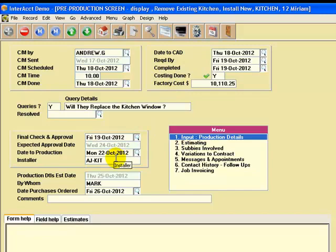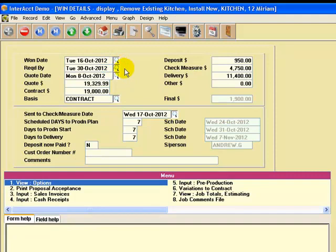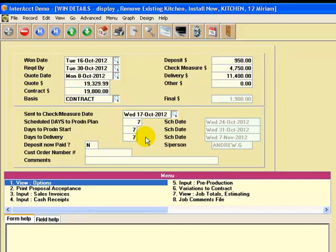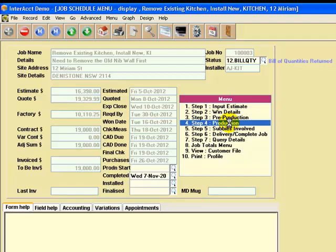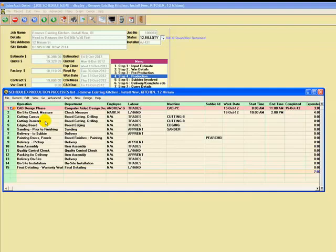The win details is where you put in what date you won it, when it's required, the contract value, what was originally quoted for, and the payment schedule in terms of when deposits and other monies would be due. You can set up formulas to calculate that automatically. There's some brief scheduling here of when we expect to start production and delivery by nominating a number of days after certain things have occurred — like days after CAD design has finished, when are we going to schedule and start production. The main interesting area is where you can schedule production by operation, and the various operations you go through to complete a kitchen job you can set up yourself, with as many as you like.